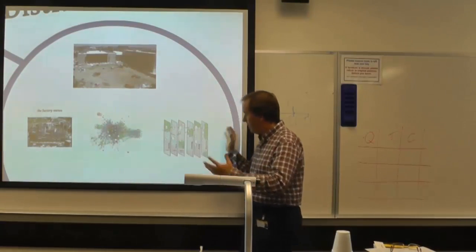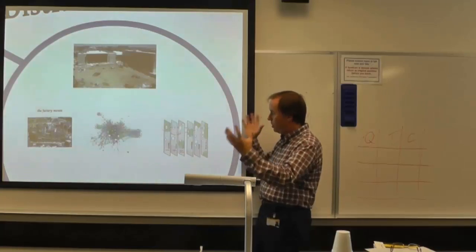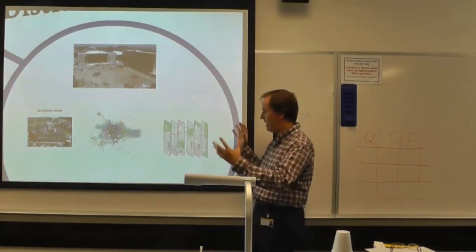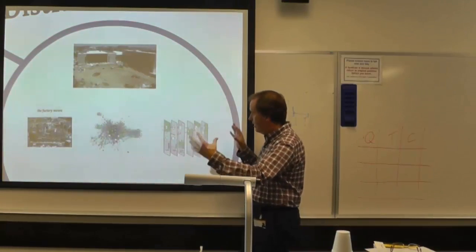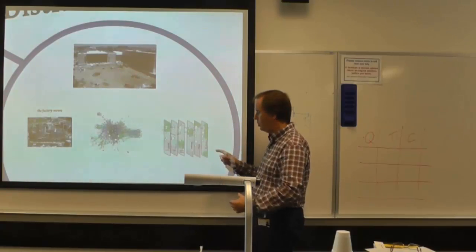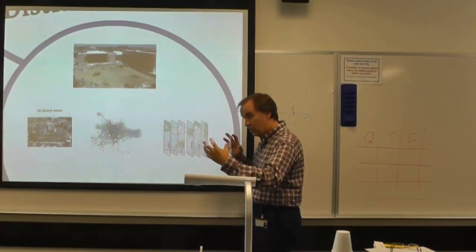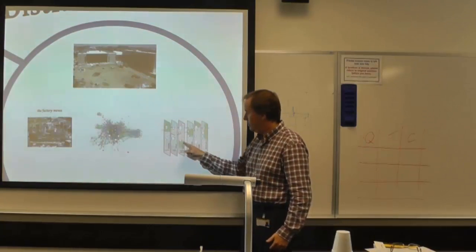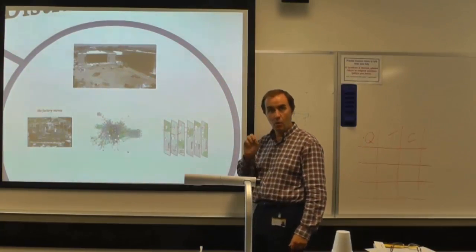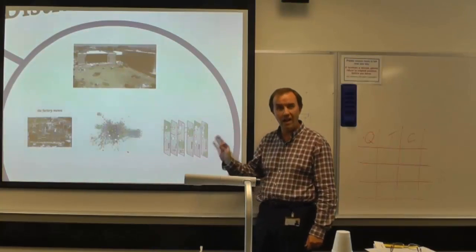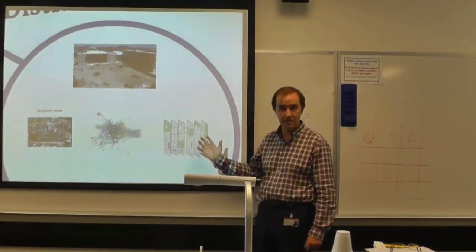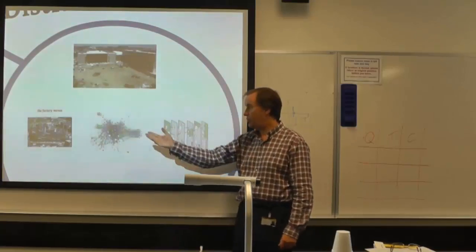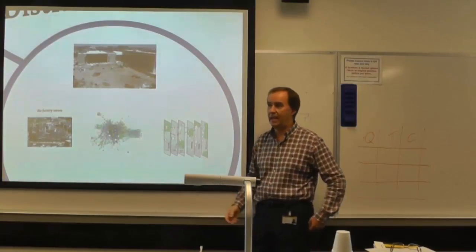It's literally about having a department or a unit or a person, whatever the scale, that sits back and is able to take those reports and pass them on to somebody who has the power to make those changes. What you are doing then is rewiring the business to enable that project behavior to happen again.